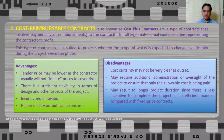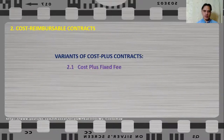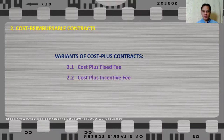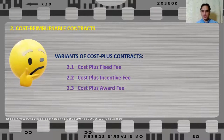Cost reimbursable contracts have the following variants: cost plus fixed fee, cost plus incentive fee, and cost plus award fee. These will be explained in detail in the succeeding slides.